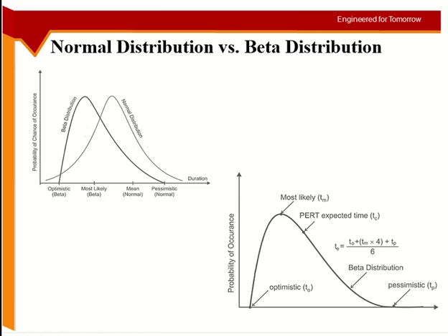So this is the main difference between the distribution of chances in normal cases and in construction activity duration case. PERT assumes that there are multiple chances of an activity duration, but they are not following normal, so the chances are not equally divided. They are following beta distribution.